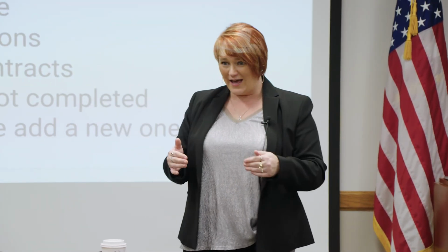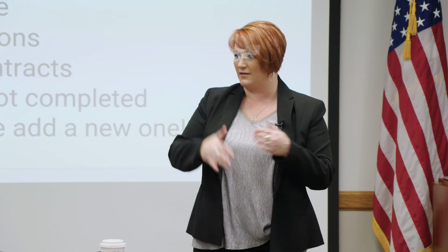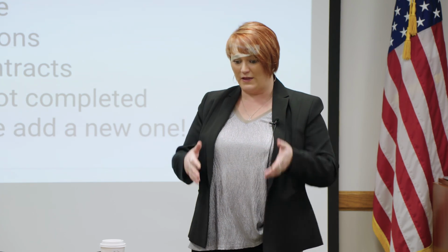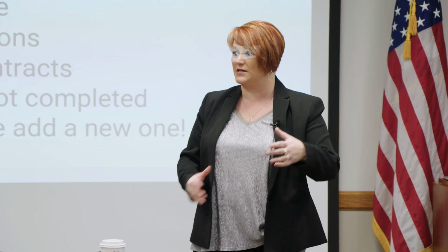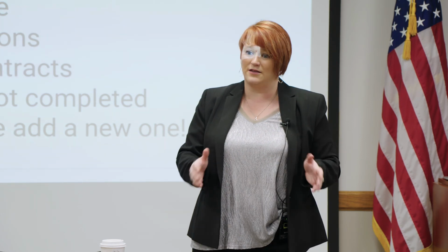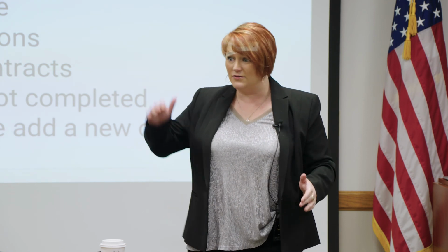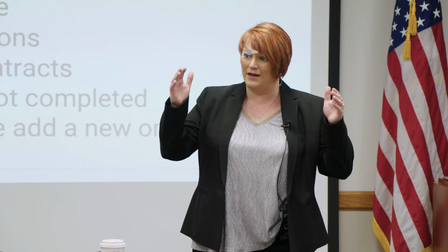That says if you don't tell them anything, they'll just automatically renew you. So please note when that contract end date is and have a conversation with your service provider about what that's going to look like at the end of the contract to take you to June 30th. Just request June 30th. I know that you're signing it in February or March for the next 3 years, but make it June 30th.